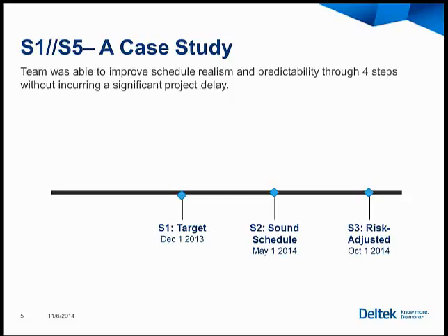Now, through the techniques that we're going to discuss today, they're variable techniques, but there's a set of guidelines and parameters that you yourself can establish for your project. Through that, the accelerated time frame for this project, with risk accounted for, with a quality schedule, was actually earlier than the targeted date. So at baseline, you've got two things at work here. You have the potential ability to finish early, and if you don't plan on finishing early, you've got some schedule margin, knowing that some of these risks might run beyond what you anticipated, in which case schedule can be allocated and resources potentially can be allocated to those areas during execution.